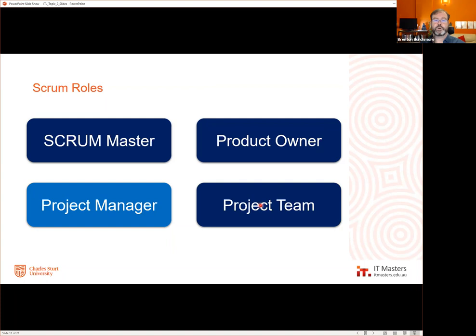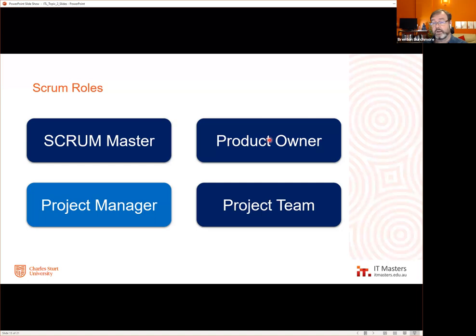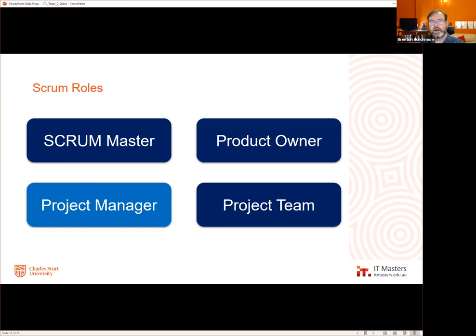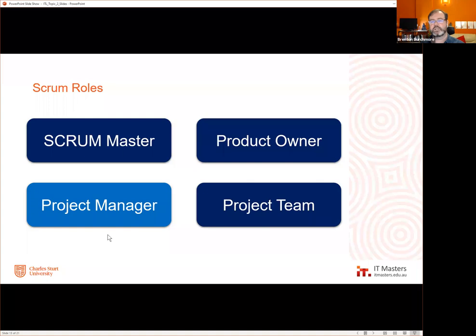You can have a project manager as a separate role, although it may overlap with one of the other hats. Generally, the project manager has a degree of accountability that the other two don't have — what about the economic viability of the team? Often the scrum master is responsible for efficiency, often the product owner is responsible for the outcome and making sure that gets paid for. But someone has to make sure that what the team is doing is economically viable to continue doing. You've got the customer perspective asking, am I getting value back for my spend every sprint? But then you have a delivery economic perspective asking, are we making enough, are we productive enough to be sustainable? That role might overlap with some of the others, but it's a different perspective — which is why it's often not technically considered a regular scrum role.